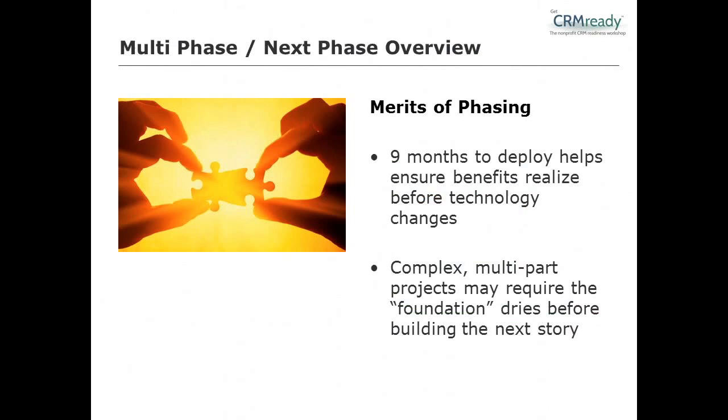after 9 months, or if you extend much beyond 9 months, the technology, the environment, if you will, can literally shift on you. Right? A 5-year project is very, very likely to be obsolete by the time you make the finish line. So we would put forward the idea that you think in terms of what you can accomplish in 9 months, and give an opportunity at the end of those 9 months for that foundation you've built to dry, if you will, and then build the next phase on. Maybe you're adding a program component or a volunteer component or an event component as the immediate next phase, and maybe that third phase is something else. But again, we are strong proponents of seeing what's realistic and feasible in those first 9 months, and start from there, or phase from there.